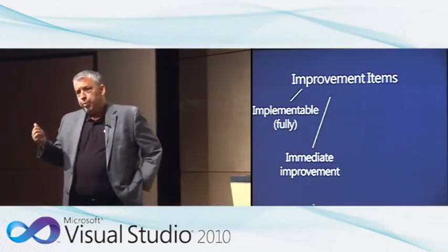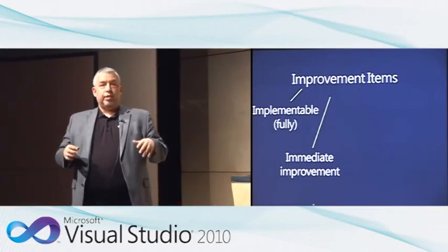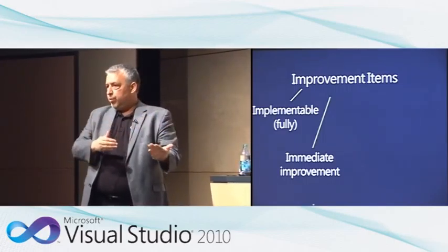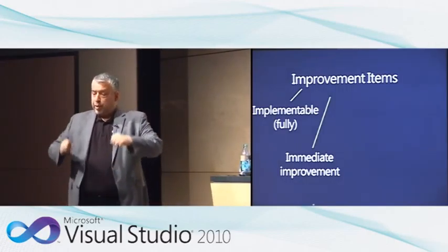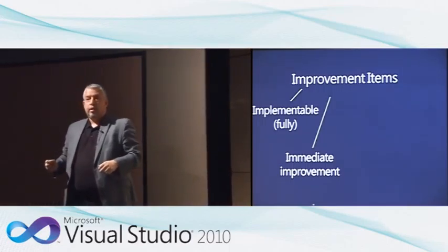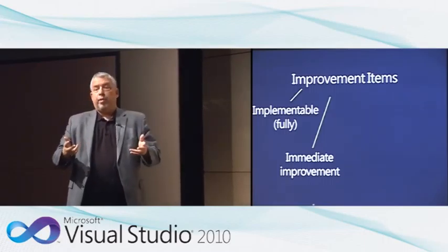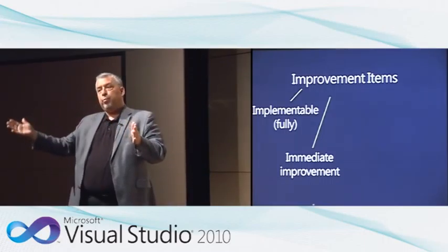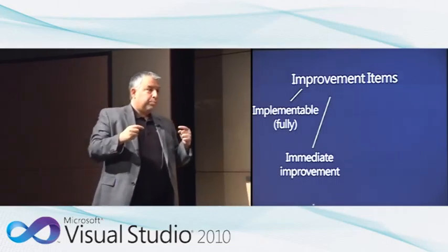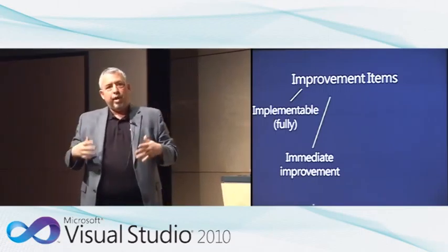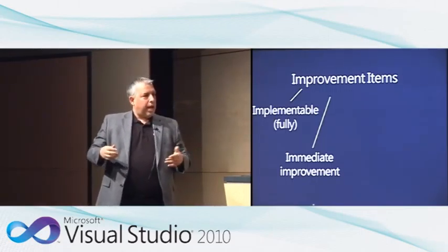Each improvement item should bring an immediate improvement. It's nice to change, but we need to be able to define this is what will improve, this is the reason. It's not, we'll implement this, and then in 2 months, 3 months, 6 months we'll get better. When we work on something, we train people, we want to have results right away, or at least very regularly. That's probably the same reasoning as in Scrum: the ROI on my improvement project happens as I go.